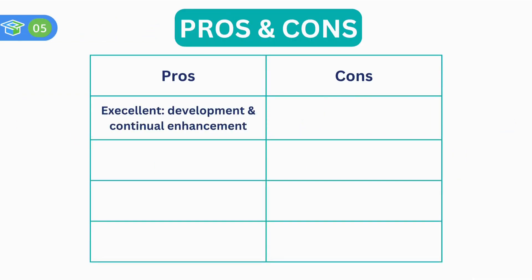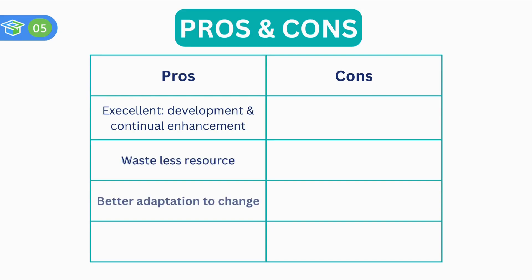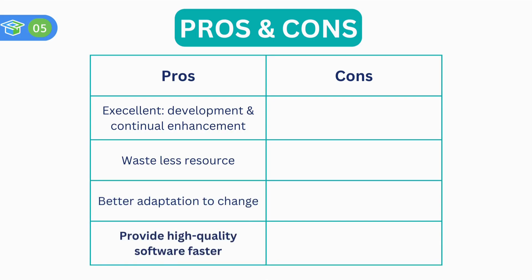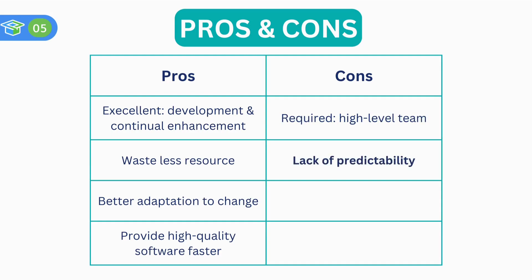Agile development is excellent for continual enhancement of a system within the established architecture. The development team wastes less resources since the work is always up-to-date and better adapts to any change. Furthermore, agile development provides high-quality software solutions faster. However, agile development still has minor disadvantages such as high-level teams must establish overall architecture and coordinate the sprints, and applying this methodology may lack predictability since agile depends heavily on flexibility and adaptability.